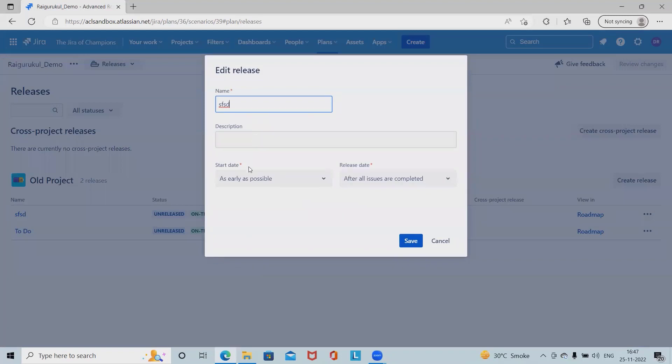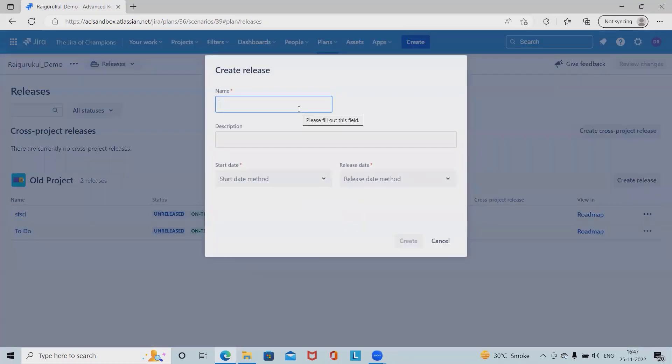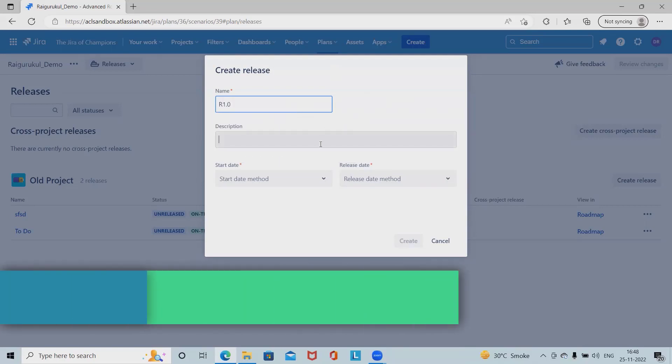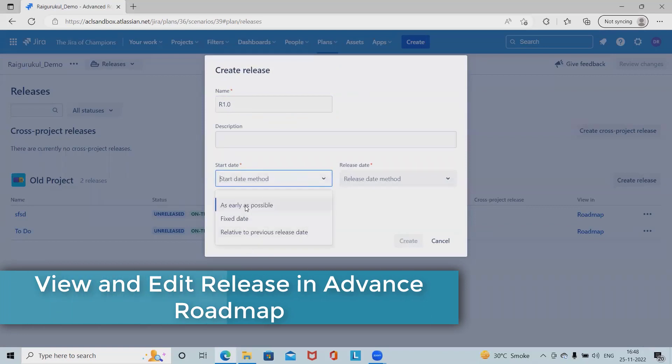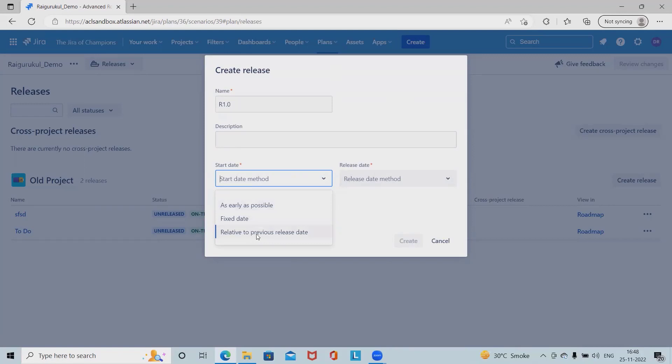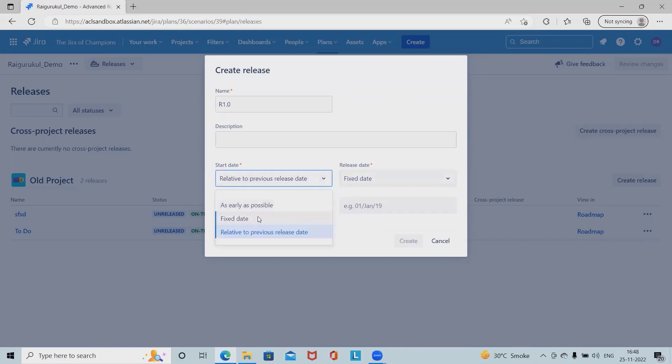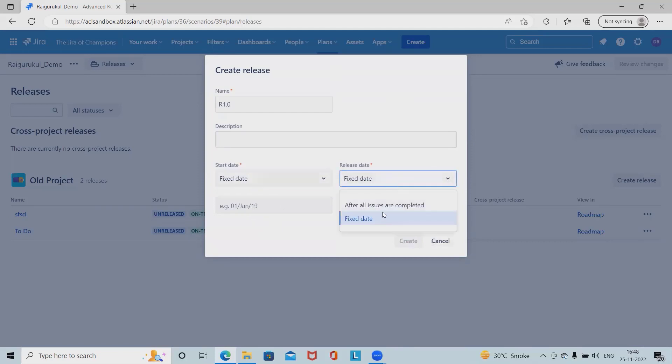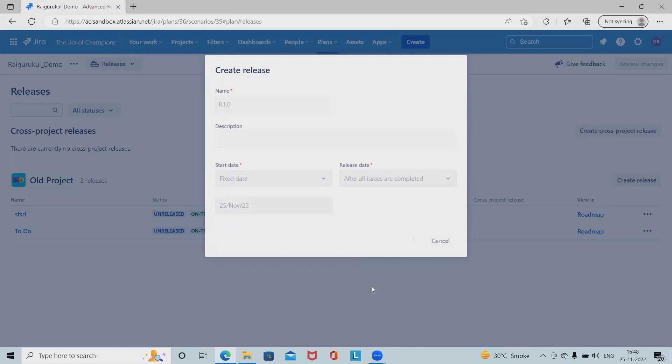Now let's say I want to create the release. Simply define the name. I'm giving R 1.0 and the description about the release. We can define the start date and end date, as early as possible, fixed date or related to the previous release date. If we're giving fixed date, this should keep all the completed release defined dates and then create.